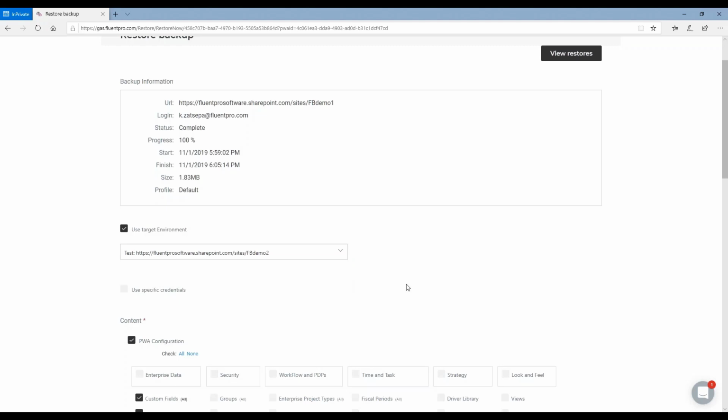That allows you to evaluate the backup, to evaluate what was restored before you overwrite the data in the production instance. Sometimes it can be very important because the project manager wants to be able to compare: is it really the version that they were looking for? If it is, then it's okay to restore that into production.